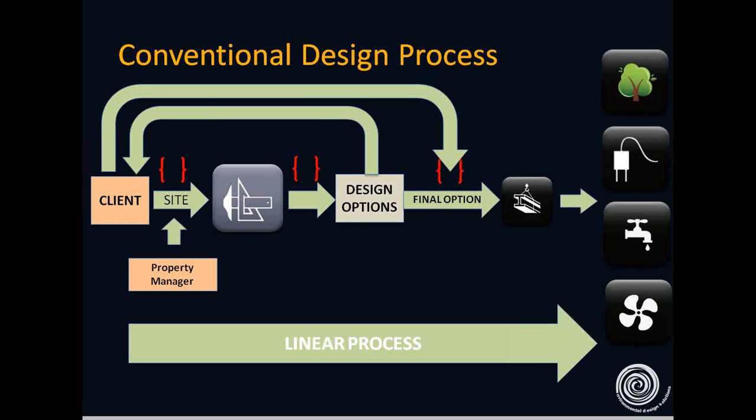As a result, the construction was stopped for a couple of months. A lot of reworking on the drawings and space planning suffered in order to incorporate the AHU space. This all resulted in cost, time, and we all agree time also translates to cost.